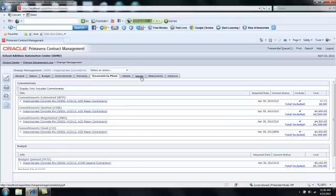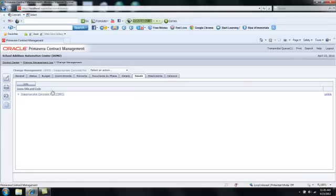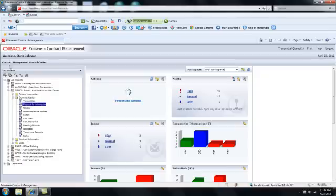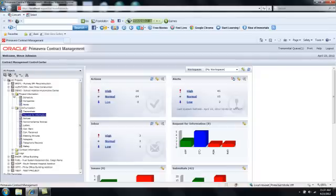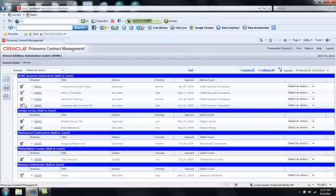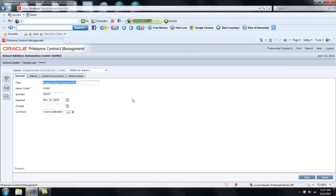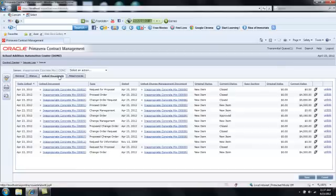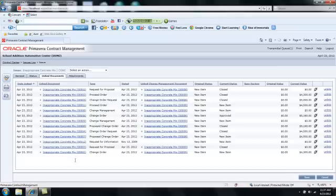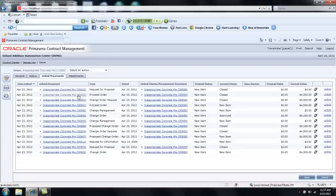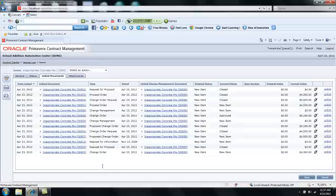Additionally, I can click Issues and see that that entire set of items was linked to this issue. If I go back to my Control Center and I expand the Project Information folder under my Project and select Issues, I'm actually going to open up the issue called Inappropriate Concrete Mix. When I go to Link to Documents, I'll see all of those various documents associated with the change, including the original RFI. And I can actually access them from this window, providing a very good audit trail as well as supporting documentation for everything associated with that change.